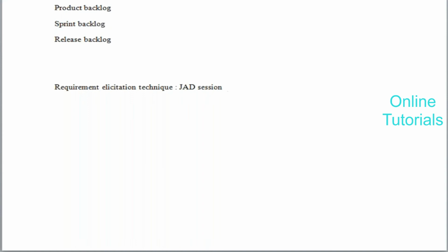Inviting all the internal and external stakeholders under one roof, at one stipulated time, and discussing the project's ins and outs, which we call a JAD session, which will be done in the initial stages of the project. Right. Okay, this is what we call a JAD session, which stands for joint application development sessions.